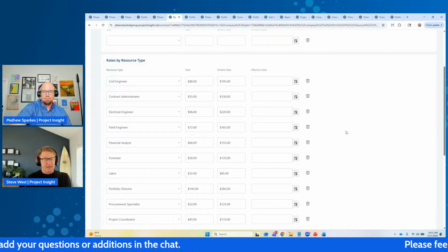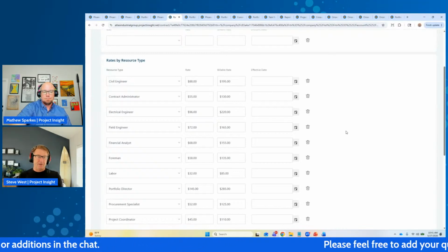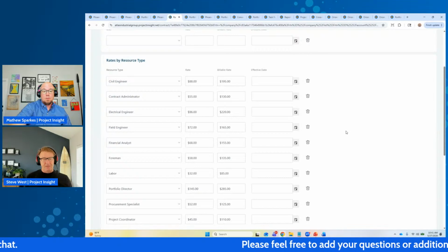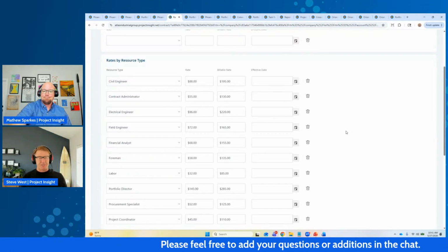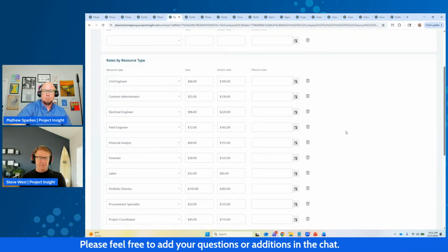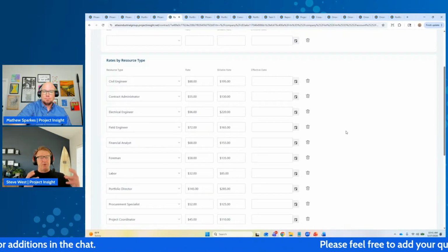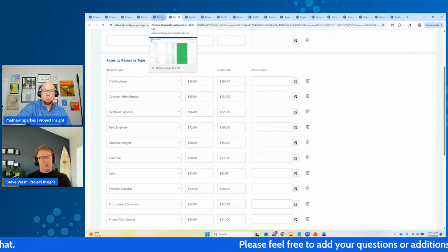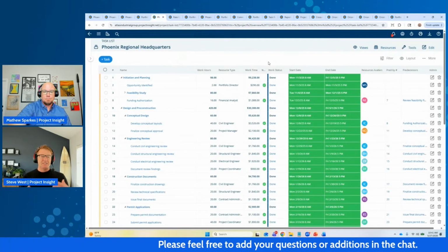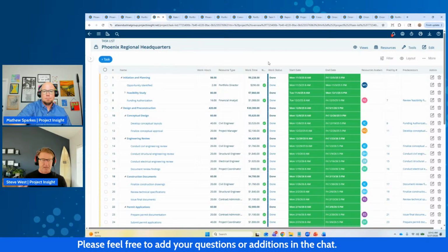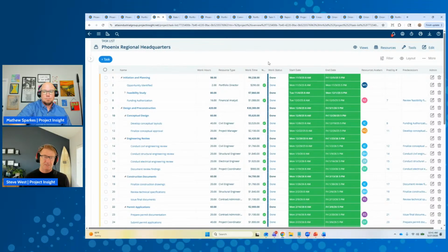And a lot of people do that anyway with something like Microsoft Project. They don't actually go to the trouble of having the differentiation between the budget and the bottom up work breakdown structure. And I think there's an advantage to doing both, because you can see, put in what you initially think from your project request form all the way to the project, see what that number is, and the PM kind of knows, well, I got to keep this budget within $1 million. And then as they build their WBS, you wouldn't want to see your planned value be higher than your original budget.